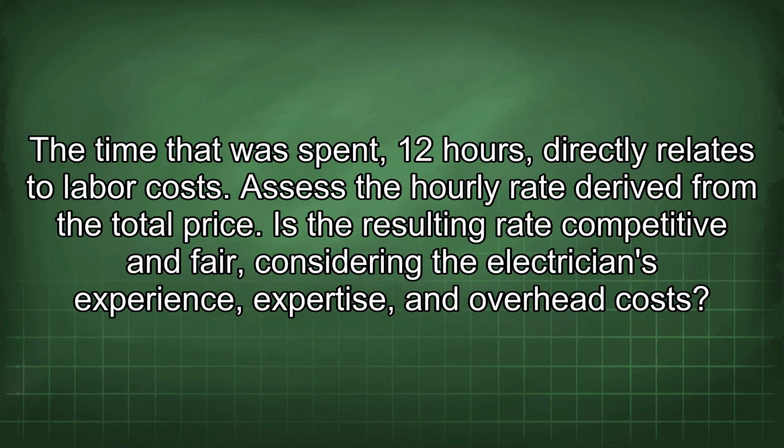The time that was spent, 12 hours, directly relates to labor costs. Assess the hourly rate derived from the total price. Is the resulting rate competitive and fair, considering the electrician's experience, expertise, and overhead costs?